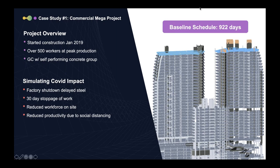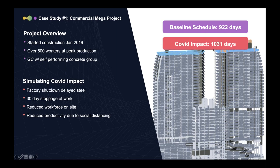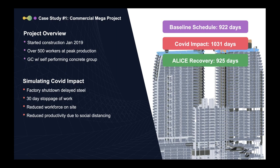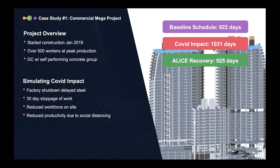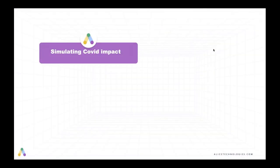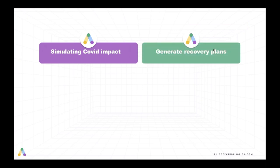Now the simulations that we ran for this project modeled the impact of the factory shutdown that actually delayed the procurement of critical steel for the project. Additionally, then they got hit with a 30-day stoppage of work. We modeled all of these impacts in ALICE and then understood very quickly how we could recover, reshuffling crews, materials, and equipment to get pretty close to our baseline schedule. The baseline schedule was 922 days. And when I say pretty close, I actually mean within 1%. It got blown out to 1,031 days. And then they were able to identify a recovery schedule within two hours that was 925 days.